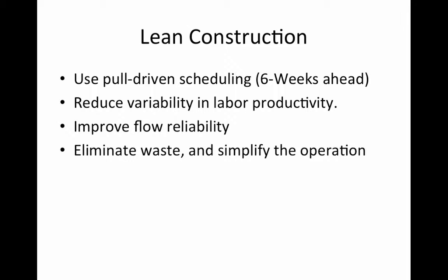Lean construction methods that were utilized on site were using a pull-driven schedule that looked 6 weeks ahead, reducing variability in labor productivity, improving workflow reliability, eliminating waste, and simplifying the operation.